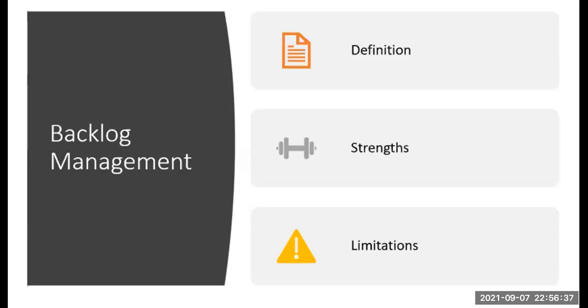Any feature that we added to the backlog and didn't pick up for the next 3 months, we tag as postponed. That means it will be delivered sometime in the future, and we move it to a different flow so it doesn't show up in our backlog. We added a Jira filter to exclude all such items, but we still have them. Next year, when you want to see the future requirements, you can always go through that. So that's one way.